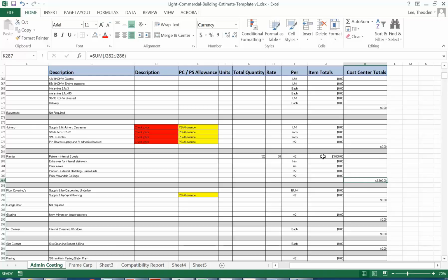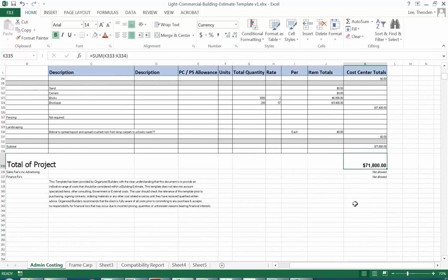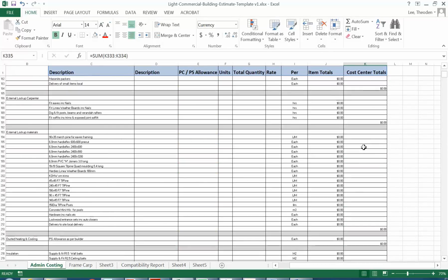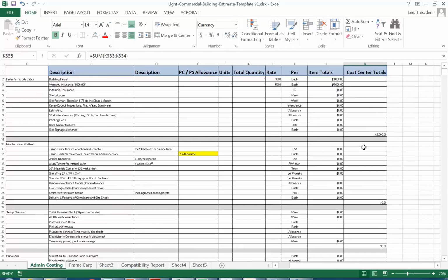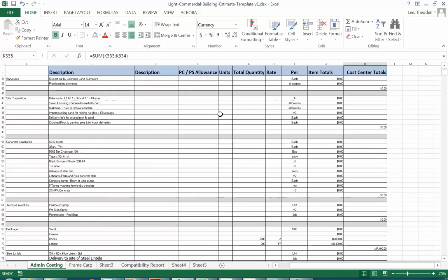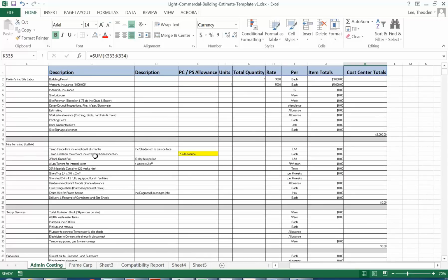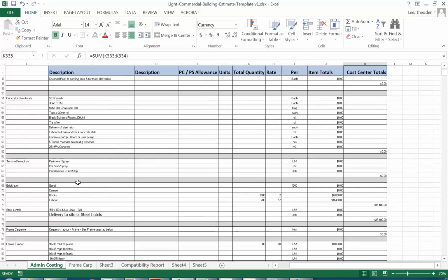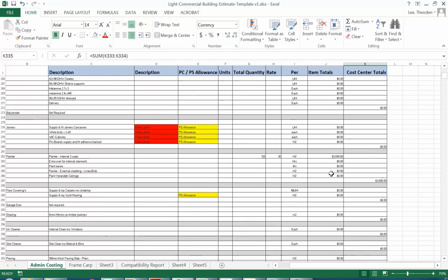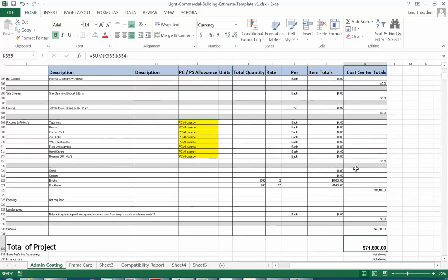So that's going to be the total of these figures here. And then at the bottom, that grand total should in turn be updated with the sum from all those cells above. Right, so you'll need to check those formulas as you go and make sure they're doing what you want them to. But otherwise, as you fill in this table and take out the parts you don't need and maybe adjust some of these headings, you can simplify a lot of it probably, then you should get a final figure. And remember, we've got that range in mind that was between 90,000 and 150,000. In some cases in the past it's gone up to about 200,000 for this one, which would be expensive, but with high quality finishes, that's what it could be.